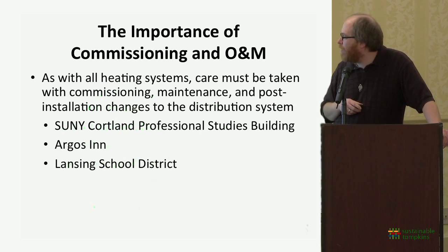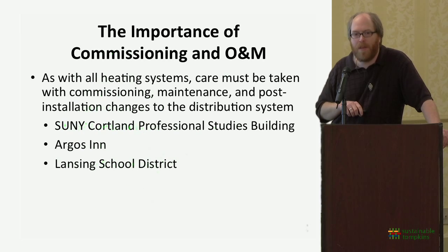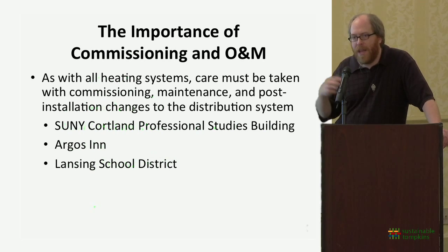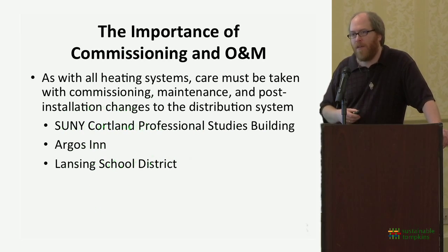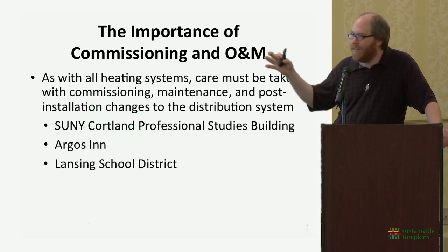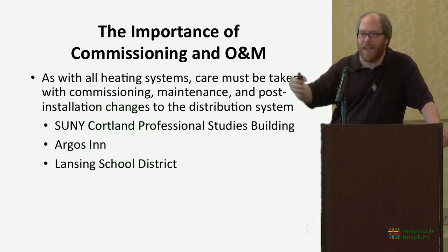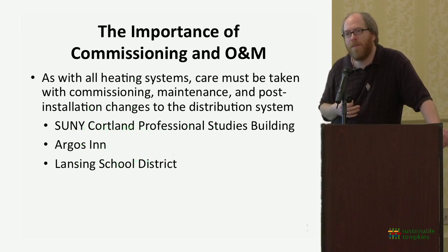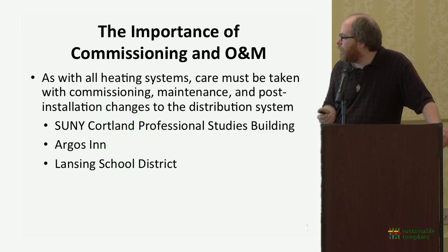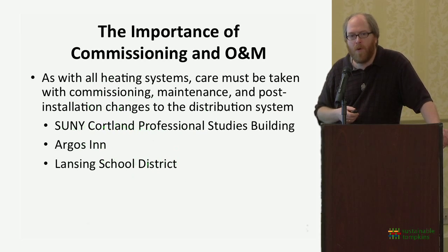Argos in, they had a system that was put in, and when Tatum did commissioning on it, they found one example was a decorative cover had been placed over some of their little heat pump units, blocking the airflow that was supposed to come out of them, and that was hurting the efficiency of their system. The Lansing School District had one.